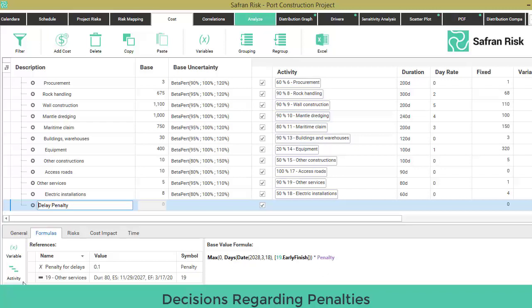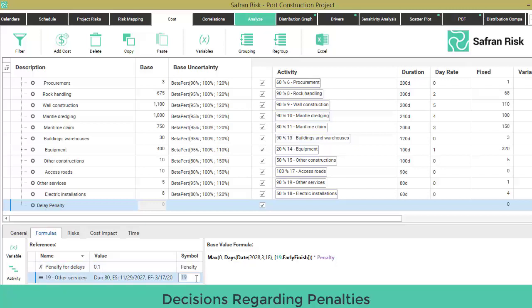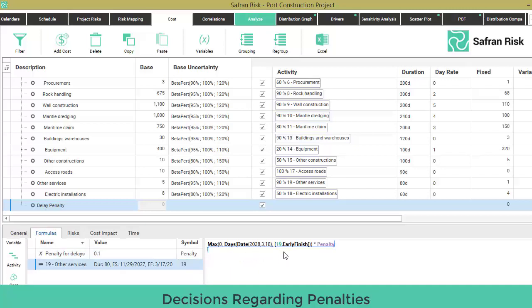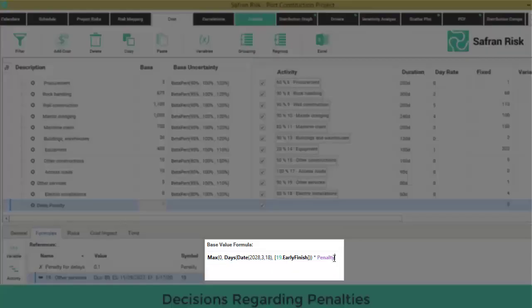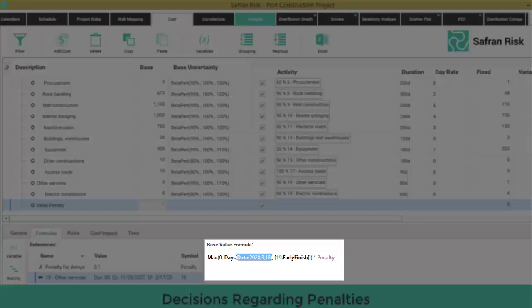Third, with these two elements in place — the Activity Referral to Activity 19 and the Penalty for Delays variable, symbolized by Penalty — we now proceed to create the following formula on the Base Value Formula field. This formula first calculates the date difference between the actual early finish date of Activity 19 and the established contractual date of March 18th, 2028. For each one of these days, a penalty of $100,000 is multiplied. The max function guarantees that only positive delays will be considered in the formula.